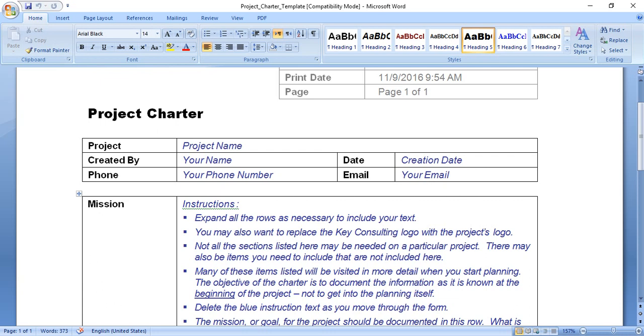For example, inspection department. Who within the department? We have to know who within the department is the project sponsor. This individual is sponsoring the project. The person must be a decision maker with the authority to commit department resources.